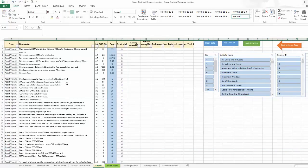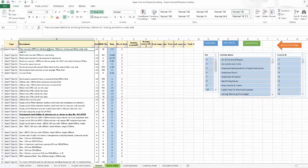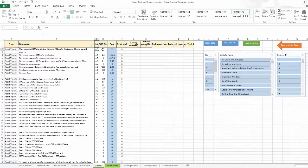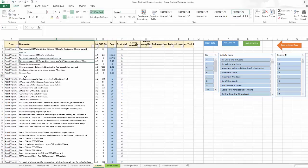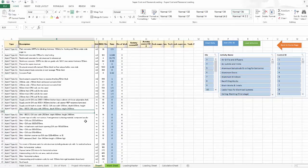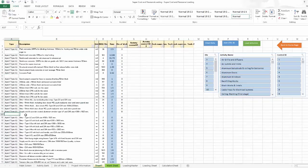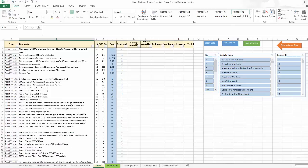Basically, what I did is I brought some BOQ items — I just copied them directly from the Bill of Quantities and pasted them here. This is the description, this is the unit, the BOQ quantity, and the rate. I added here the division of work. As you can see, there are some beige numbers and some blank rows and some missing information, so the Excel sheet will help me to clean this data.